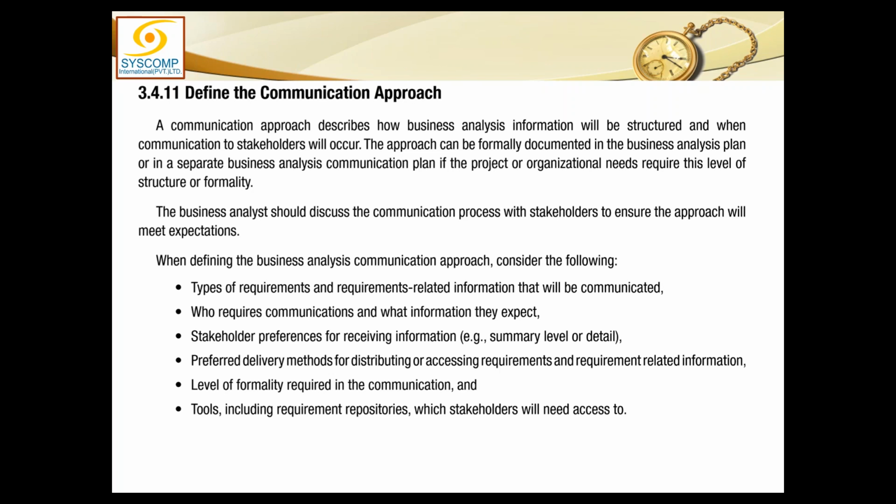When I am doing a project for another organization, the communication channels we establish have to be mutually agreed. The communication policies of both organizations have to be studied to see what they consider email as. If one organization considers it formal and the other informal, then we can negotiate between the organizations to define the communication approach.